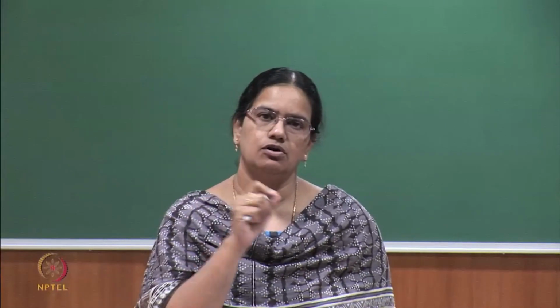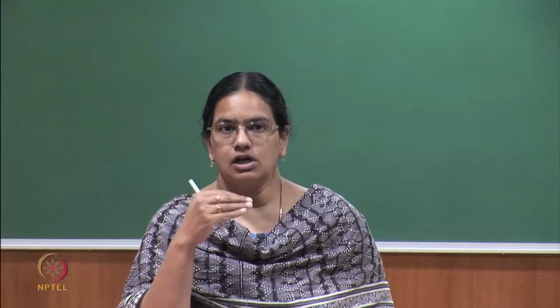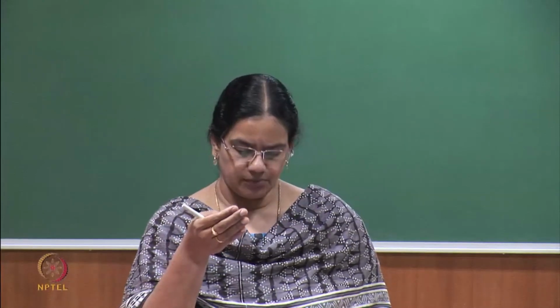The next is, with this I can easily get my skeleton DSM and I can fill in my relationships. But what happens is, if you wrongly identify a relationship, or you put the relationship in a different place, or you miss out identifying a relationship, you get a different result altogether. In order to avoid that, we are using a new methodology. So, this methodology is nothing but multiplying 2 matrices so that I get a DSM.